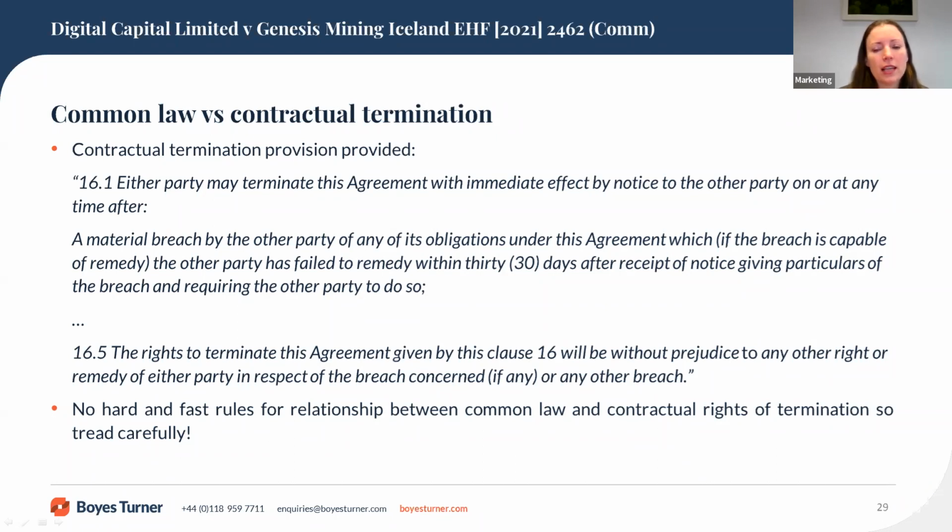Here the judge said that on the face of it, the clause applied to any material breach, whether repudiatory or not. If clause 16.1 was looked at in isolation, then the judge said it would have been distinctly arguable that remediable material breaches would only be treated as repudiatory if they were not remedied within 30 days. That construction did not exclude the common law right to terminate for repudiatory breach, but it simply defined the circumstances and the conduct that was required to trigger that right.